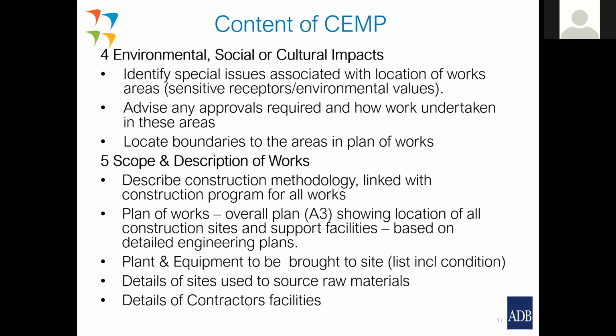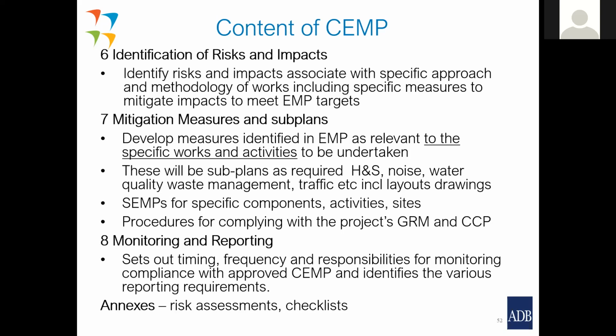Plant and equipment to be brought to site, details of sites used to source raw materials, quarry sites, disposal sites, that sort of thing, and details of the contractor's facilities. That includes his camp management, his camps and his works areas. And then we need specific identification of the risks and impacts associated with his specific approach and methodology of works, including specific measures to mitigate impacts to meet EMP targets.